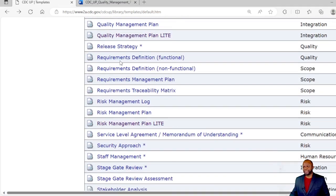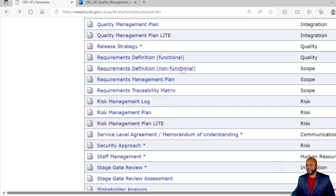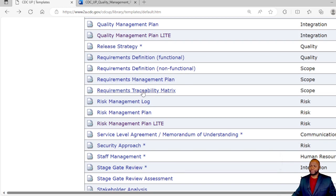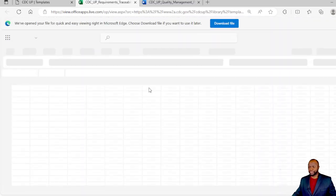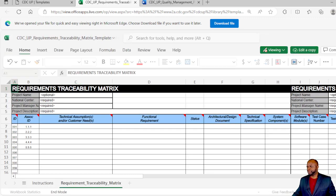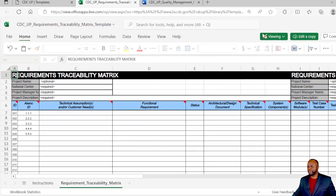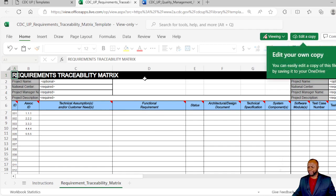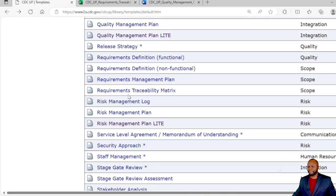We have release plans, requirements definition functional, non-functional, a requirements management plan, a requirements traceability matrix which is one of my favorites. That just shows how you can track the requirements to their origin, could be extremely helpful to you as a project manager.